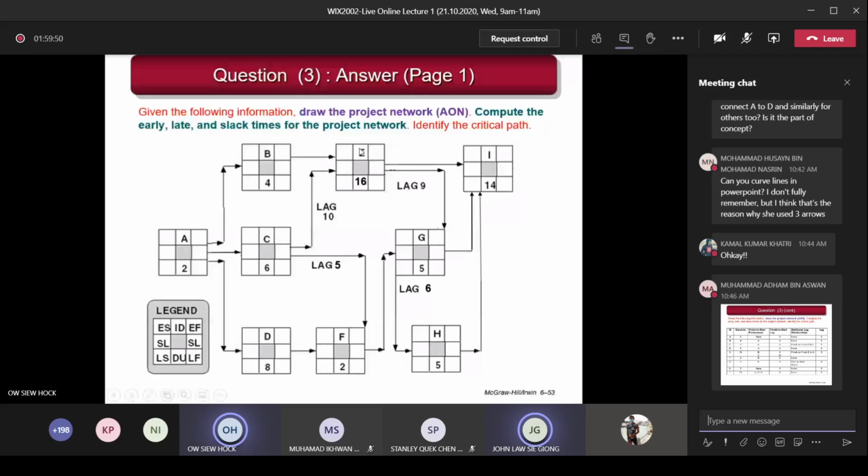But you see this E from C go to E, you can see the value 10 there. Finish to start, C finish and then go to start E. Can you see that the column finish to start in the E, along the E there? Yes. Can you see C, and then after C is the 10, so that means from C finish, C go to start E, there's a lag of 10. So write the 10 here, you understand?